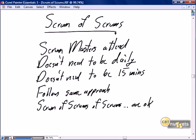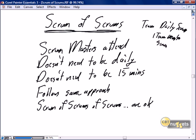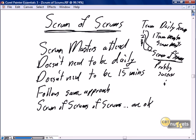A very common concept when we scale Scrum for larger projects is we develop this concept of a Scrum of Scrums. So each team has their daily Scrum, following all of the principles we've already described for the daily Scrum, and then one team member, typically the Scrum Master, attends a Scrum of Scrums. And by doing the Scrum of Scrums, the four teams, 1, 2, 3, and 4, are all represented, and their problems, their successes, their issues are represented, and the representative, again typically the Scrum Master, can go back to the team, either directly if it's urgent, or in the team's next daily Scrum, and present